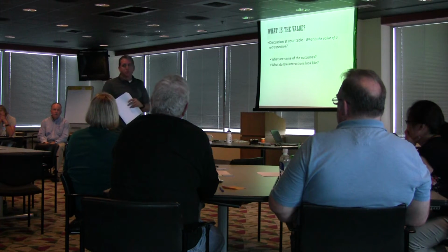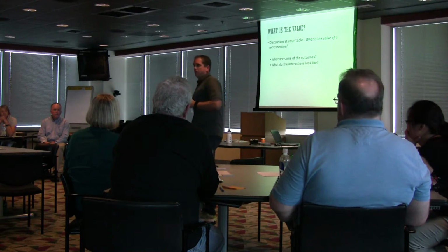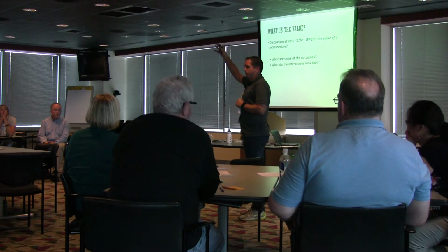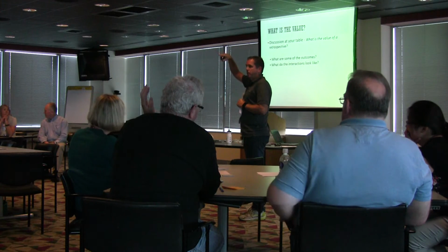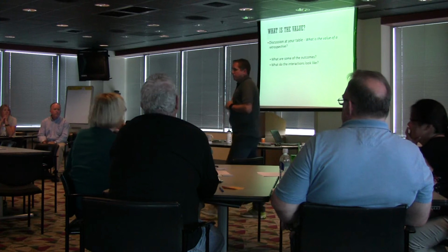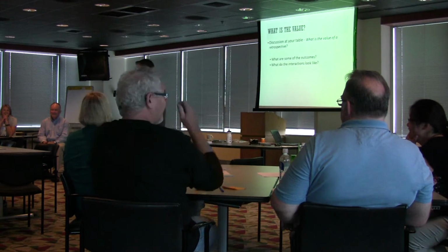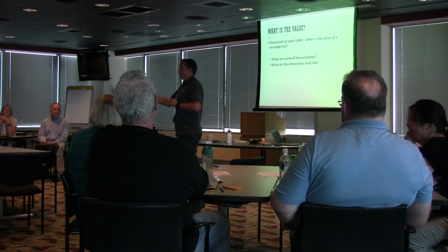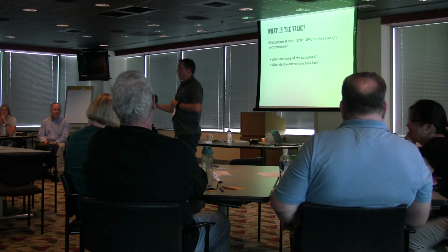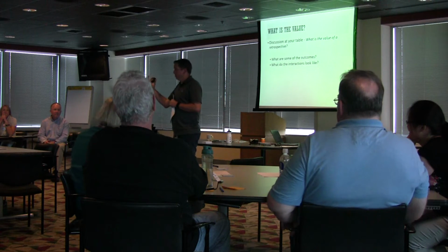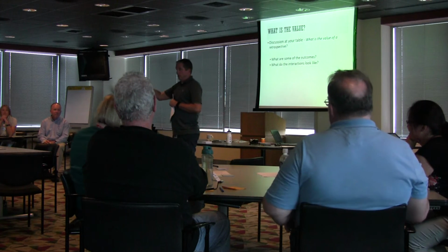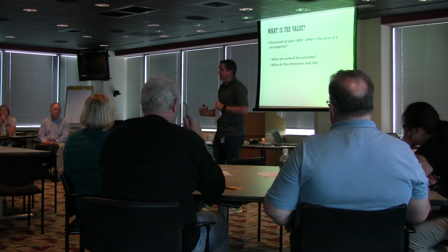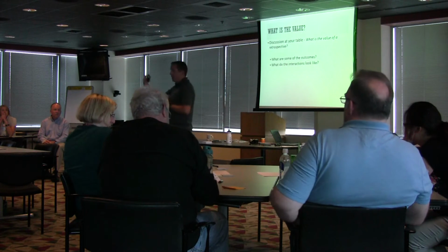Action items on how we improve. How many of you on your team have an improvement backlog? Okay, good. Okay, awesome. So, okay, good question. So think of your product backlog. It's a list of items that we want to do. They're not all equal in priority. You with me? An improvement backlog is akin to that, except they're specific to improvements that we as a team want to make. They are not all equal in priority.